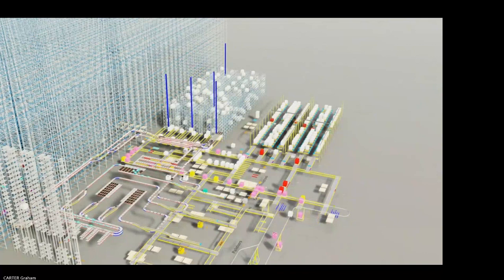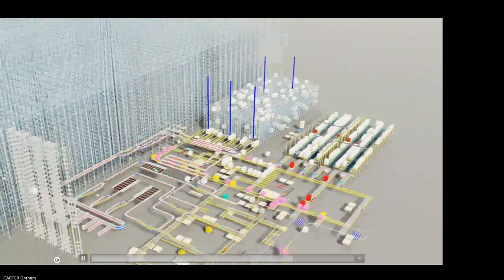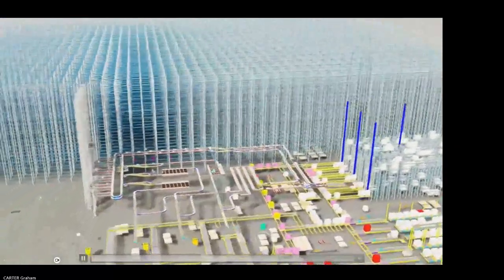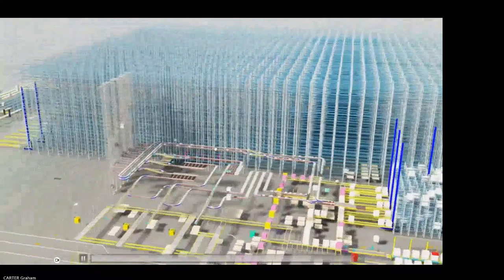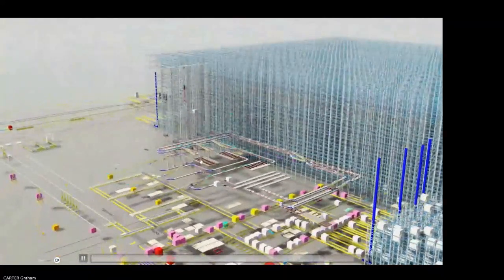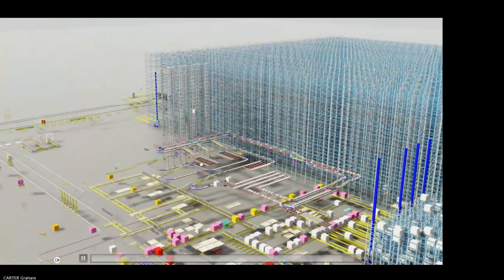As long as the cost and effort of doing the digital twin is rightly proportionate to the overall investment, what's not to like? If you've got a 3-month commissioning window and it takes you 6 months to build your digital twin, we're probably failing in our digital world. So it's about the ability to build quickly, to solve our challenges.